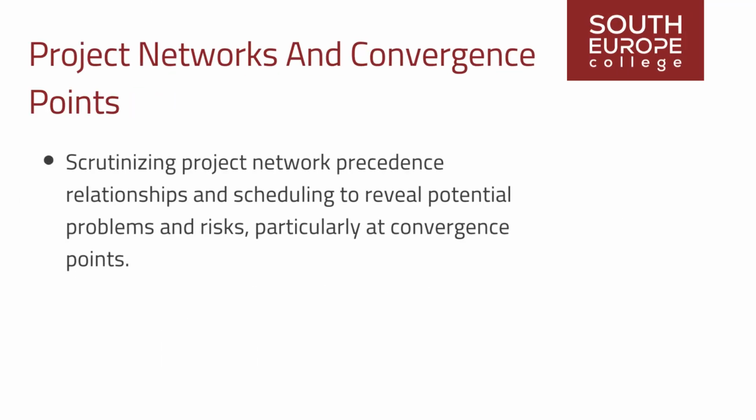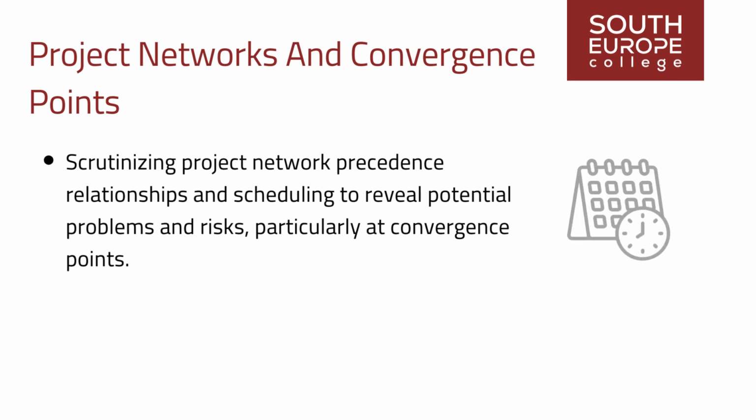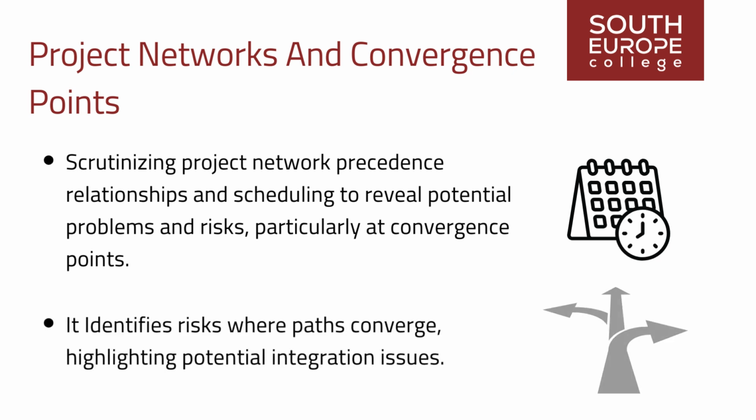Scrutinizing project network precedence relationships and scheduling reveals potential problems and risks, particularly at convergence points. It identifies risks where paths converge, highlighting potential integration issues.